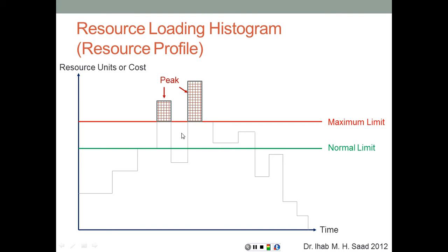We also notice troughs — areas where resources are available but not needed. Like in Tetris, the strategy is to fill troughs with peaks. By redistributing resources — moving peaks to fill gaps — we perform what will later be called resource leveling.